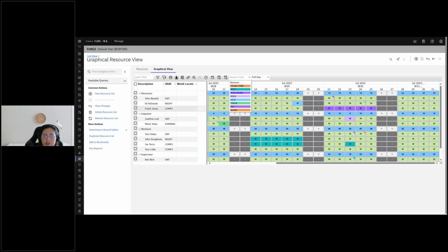I can modify either for a full day, a partial day, or a full week by selecting from the drop-down list. Partial days are displayed with the corresponding non-working time color in the upper right as a triangle. This view is great for understanding long-term availability, bottlenecks, or constraints that you may face in your upcoming scheduling windows.